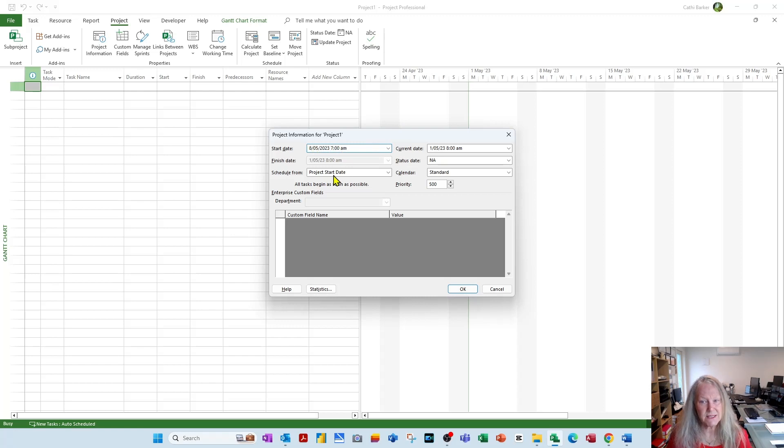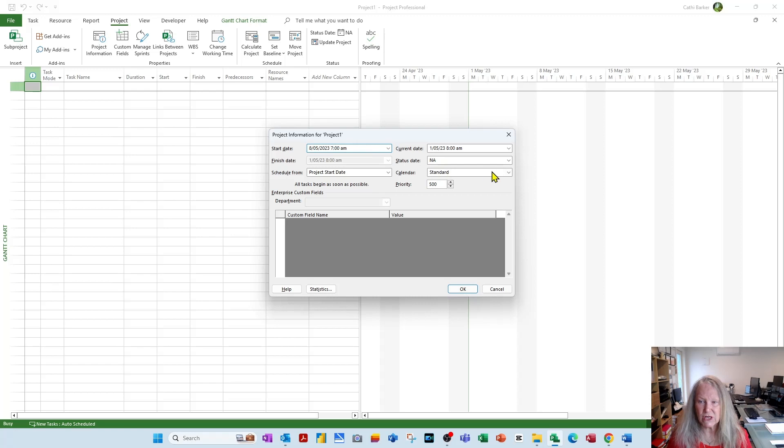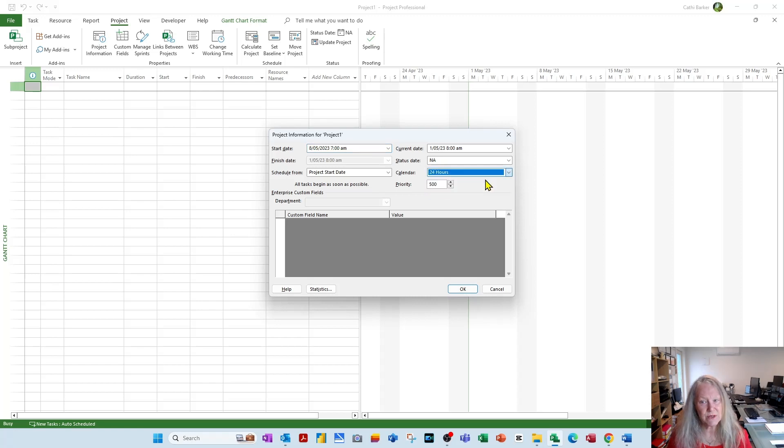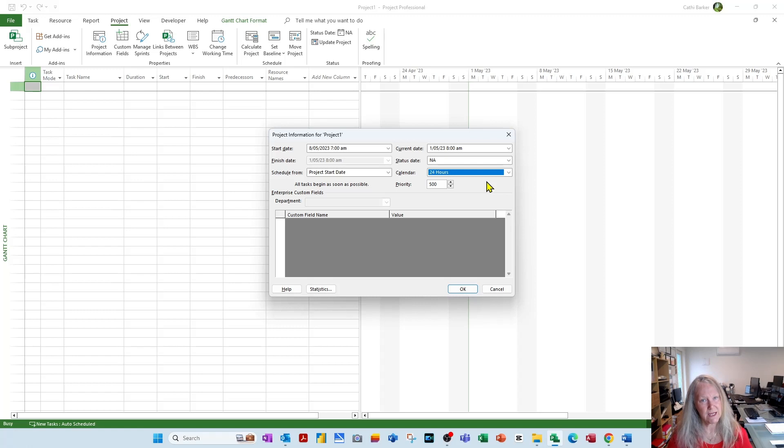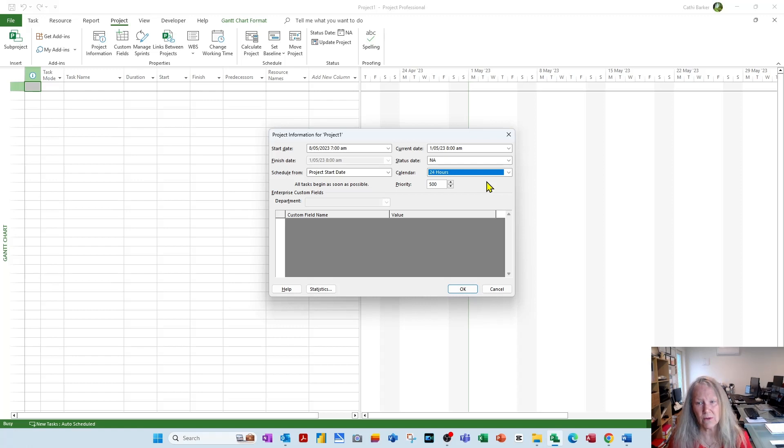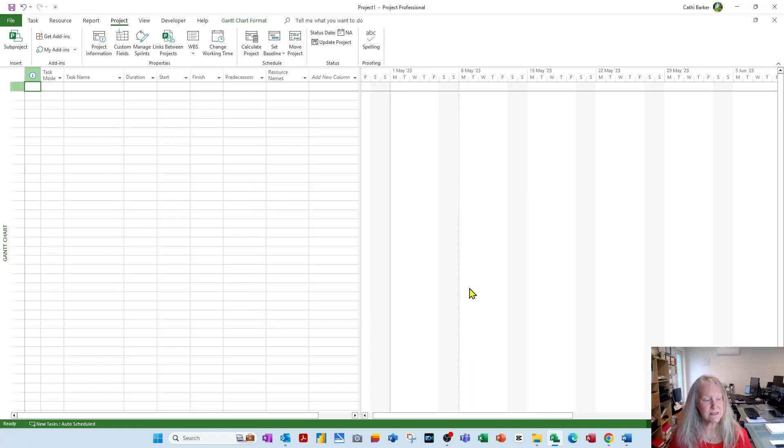This is a start date-driven project, and that's when we're starting. The next thing I want to do is change it from a standard calendar to a 24-hour calendar. This project is dedicated to creating a 24-hour project template, so we need 24 hours. And so choose OK. That is step 1.